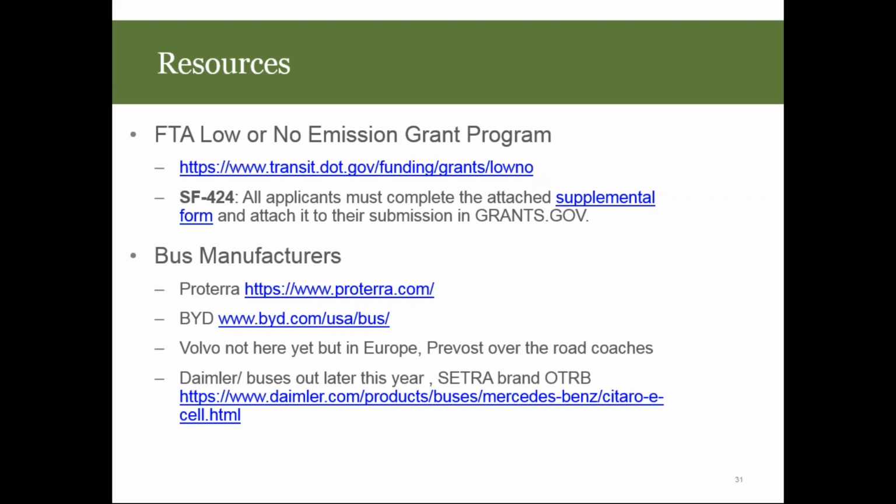Yeah, I think it's related to what Blake was talking about. Notwithstanding the problems with getting legal and contracts folks on board, I think going back and having a manufacturer partner has more advantages than it does downsides. And I think if Mountain Rides would have had that going in, that would have resulted in probably a better time frame, after the fact, because there's going to have to be more of a traditional procurement to determine that partner.